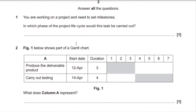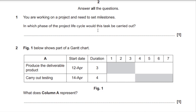Question 1. You are working on a project and need to set milestones. In which phase of the project lifecycle would this task be carried out? One mark available. There are actually two phases you could write here: it could be carried out in the initiation phase or the planning phase.